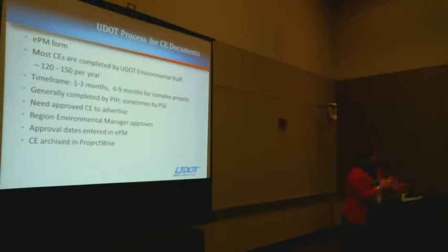If a CE gets completed outside the region or reviewed outside the region, it still comes back to the region to do that final approval, since the region environmental manager has sort of that ownership for their program. And then we archive them in ProjectWise as well, so they're part of the project file, if anybody needs to look at that later.